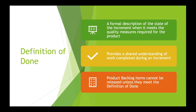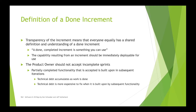If there are multiple Scrum teams working together on a product, they must mutually define and comply with the same definition of done. Examples of items in a software team's definition of done might include quality items like code reviews, unit testing, static analysis, and integration testing, or development housekeeping items like code documentation, capturing of technical debt, configuration management standards, or management of test datasets. A well-defined definition of done brings transparency into practice, ensuring that everyone has a shared understanding of a done increment, which ensures that the increment results in something that can be used and is available for immediate deployment.